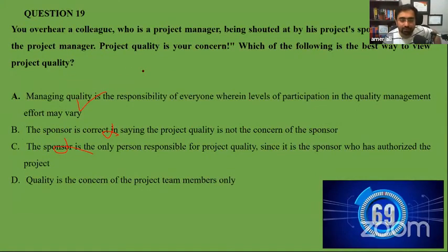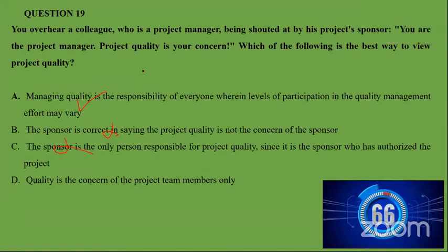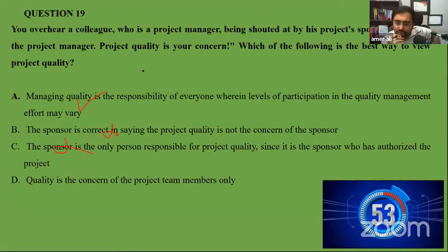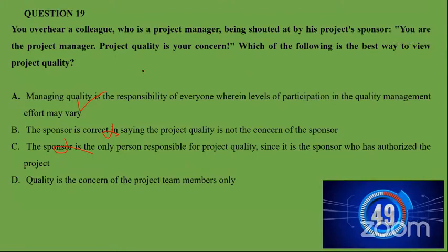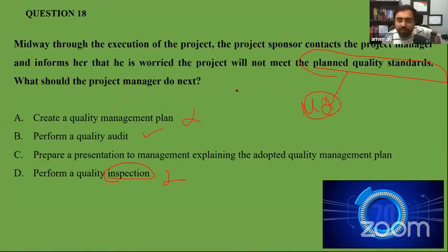So guys, yes, Bio? I think audits are to be done by stakeholders that are external to the project. What is your question? I didn't understand the question. In the previous question, audits are to be done by stakeholders external to the project, so why should the project manager do audits? Anyone can do the audit. Who says that the audit has to be done by this person or not this person? Audit can be internal, audit can be external. Who says that the audit has to be external? It's not compulsory. Most of the time, quality audits are internal. It's not written anywhere. Audit can be done by anyone.